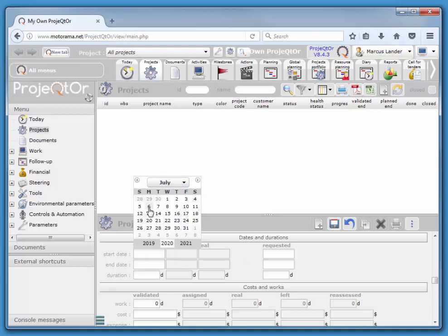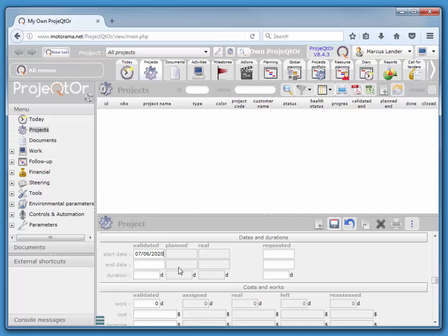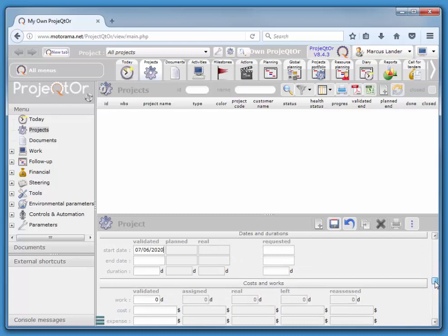And there are some interesting details about the calendar. However, the calendar that I'm using will be shared with all of you. So the calendars are global. So I'm not going to have you manipulate any of the calendars in my course, so I'm not going to mess with any of that. I'm not going to add the duration. The duration will actually come from the Gantt chart once we add all of the activities and link all of those activities. The default for all of the activities will be once we finish one activity, another one will start.